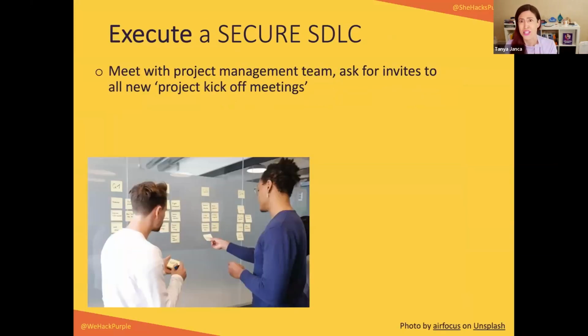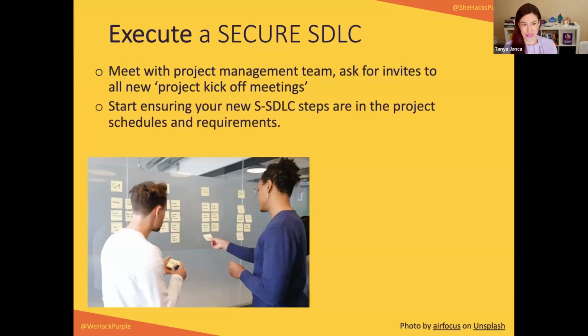So now let's execute. So we're actually doing a secure system development lifecycle. Again, meet with the project management team and ask for invites to the kickoff meetings. That's the best meeting to be at. Like, hi, I'm Tanya. I am your assigned security human. I am here to help you. I try to ensure that my new security steps within the system development lifecycle are in the project schedule and in the requirements, so there's no avoiding them.